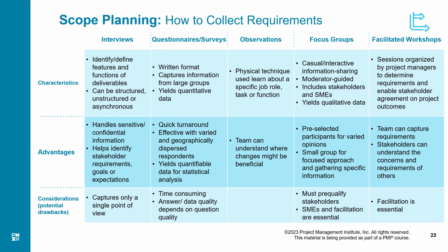We can ask them to submit their opinions anonymously, maybe on a piece of paper, or like a voting process where nobody else knows what they have voted for. Then we summarize those things, write all the points in the facilitated workshop, display them on a board, and ask them to vote. And ultimately we gain our consensus. This is called wideband Delphi.